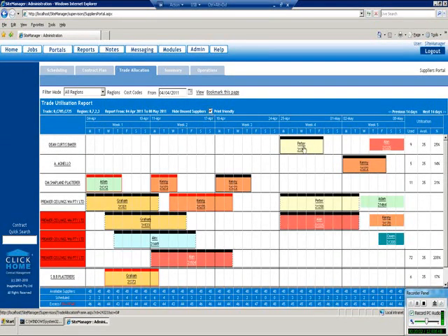And you'll see it's moved across there. And that has sent a reschedule out to that supplier, and they will receive the appropriate call-up. And so that's just acted upon right there and then. So that's moving the plan date.